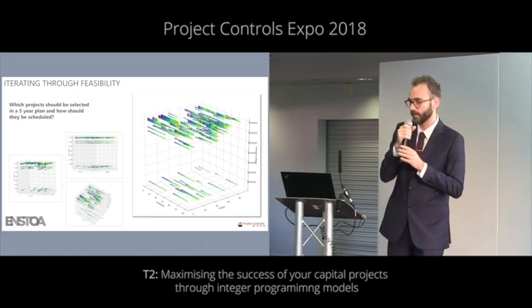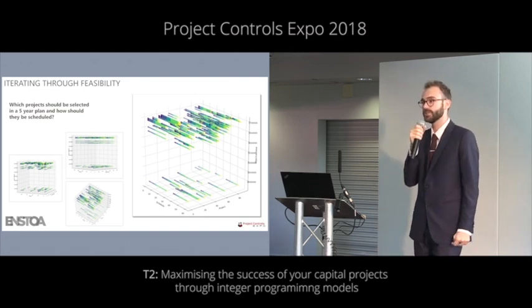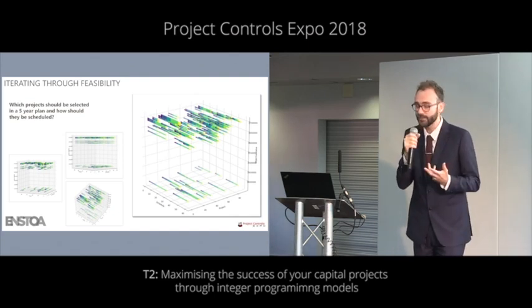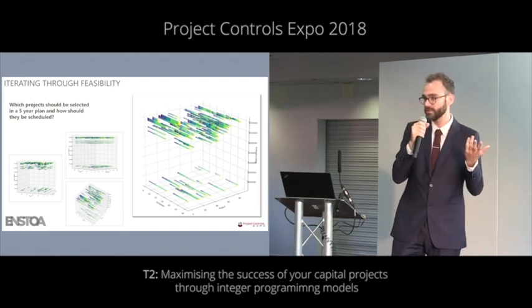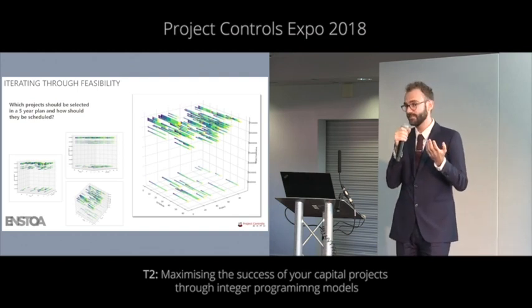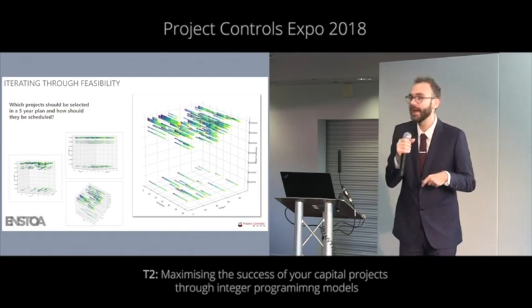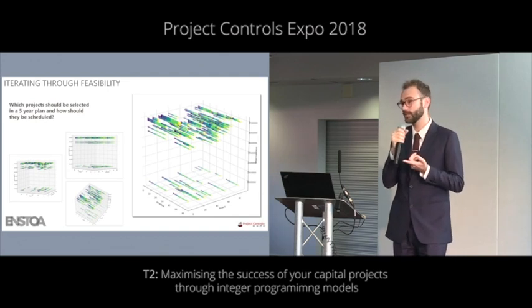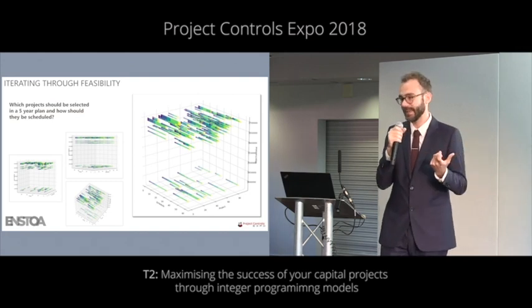Similarly, on the other side of the coin, if you looked at that set of 50 projects and you said, I am going to select the top 10 projects in terms of their individual return on investment, and I'll figure out how to schedule them later, if you did that, you were ignoring the opportunity cost of every given project. For example, one of those 10 you selected may be very resource intensive, and it might bind your organization's resources for 2, 3, 4, 5 years. And it may in fact be better to actually do 4 or 5 smaller projects that are much less resource intensive but lead to a greater aggregate return over the same period. That decision metric of selecting the top 10 doesn't consider that counterfactual.